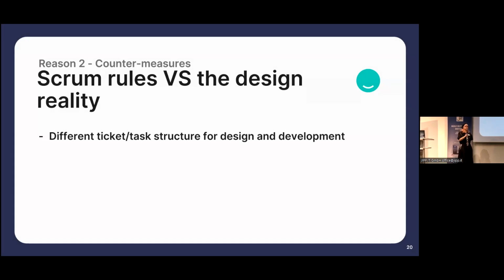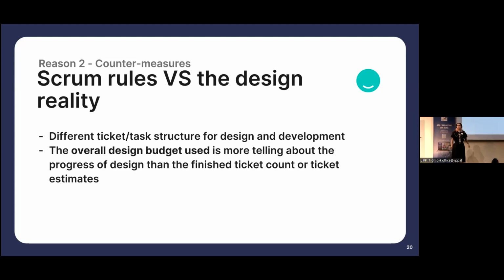First of all, we needed different ticket or task structures for designers than for dev. And my advice for you would be to take your designers and say, hey, we have these features. How do you want your tickets to look like? And they will tell you, because in their head, they already have the visual separation of, okay, registration is this part with like a little form, and then we have a dashboard and we have the widgets, etc. And they will be able to tell you how granular the tickets should be, so that if they work in Figma, they don't have so many overlapping tasks, and they can just say, okay, I'm working on this ticket, and it is these kind of designs.